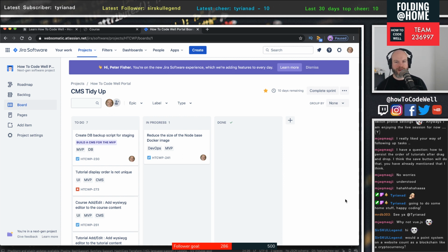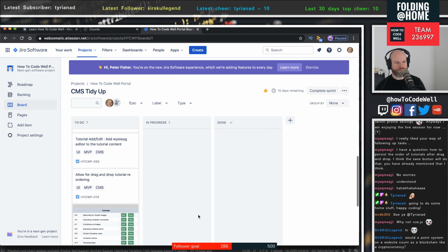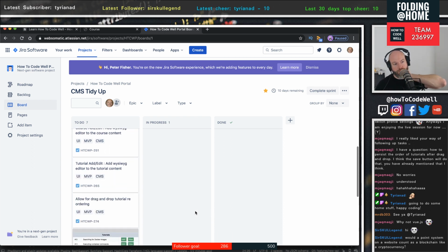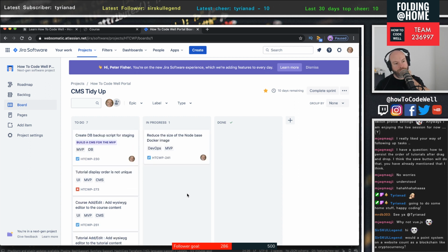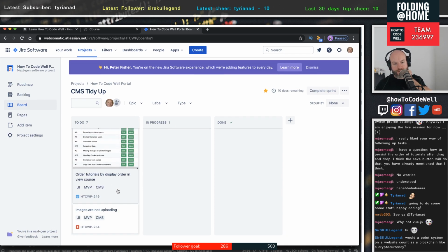Right. Okay. I think that will suffice for this sprint. It's quite a nice one, this one. And it's for 2 weeks, so we've got all of next week, and we've got all of the week after. On a Sunday, I'm hoping to do another review like this where we plan. So I'll be doing these tasks Tuesday, Thursday, next Sunday, and then Tuesday, Thursday, and potentially that Sunday too, if I don't complete these in the evenings after work.